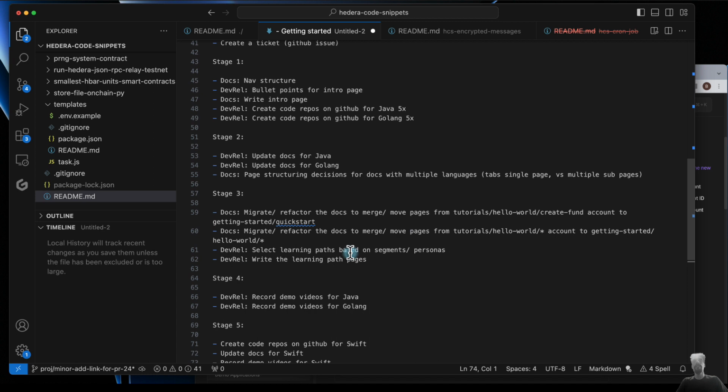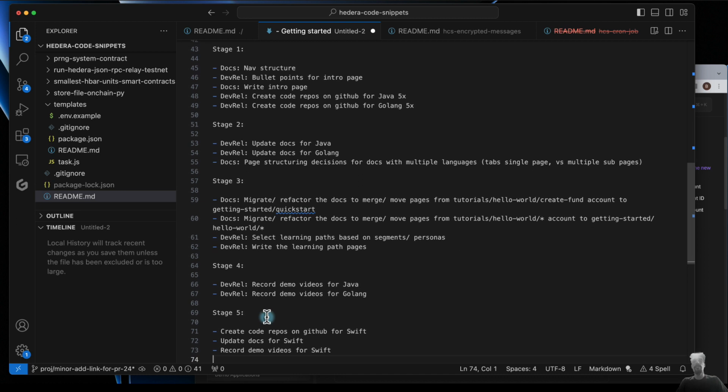All right, so this is the plan, 5 stages, right? And I guess the overarching thing is that, coming back to the impetus, right? Why this is being done: to reduce confusion. Stage 3, where this migration effort happens, is the key thing that needs to happen, right? And so we want to front load that as much as possible. So everything in here is absolutely a prerequisite to this happening. And so that's why we put that in stage 1 and 2. And then we split stage 1 and 2 up, mainly because we can't do this stuff without the stuff having been done before it, right? So that's the reason for stage 1 and 2 being split that way.